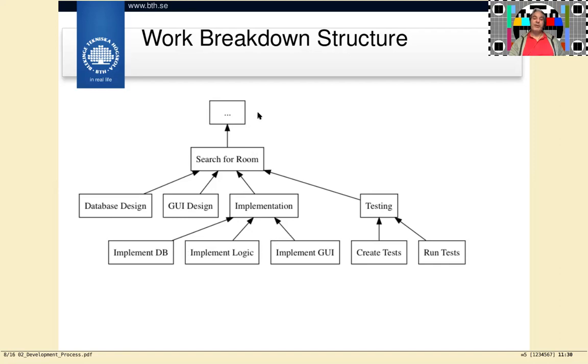Don't start with saying that, well, I have so and so many hours. Let's say I have 1,000 hours here, so I'll spend 500 hours on this one, 200 hours on this task, and then 300 hours on that task. Don't do it like that, because those kind of estimates have no anchoring in any form of reality. Really, it doesn't matter how long any of these tasks are going to take. This is what you need to do in order to complete that task. So focus on what you need to do first.